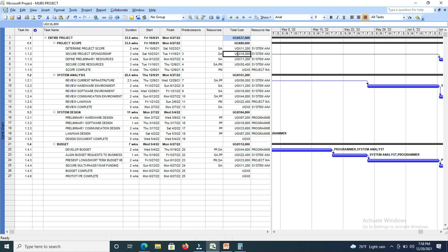Okay, so that means we shall say 8 hours times the 100 shillings, meaning this person earns 800 shillings per day. But how many days are they working in a week? Since Saturdays and Sundays were made working days, that means they are working 7 days a week.